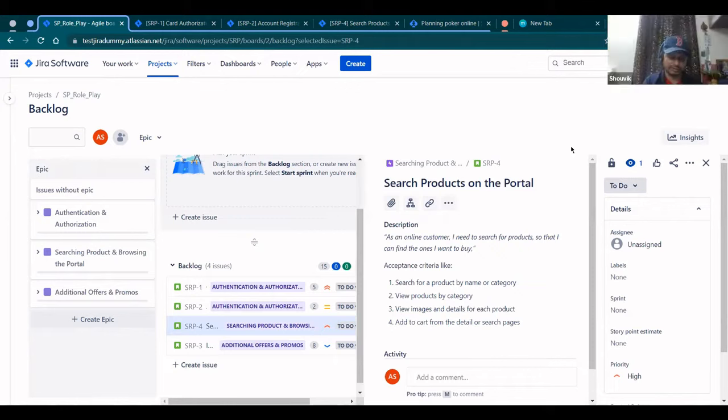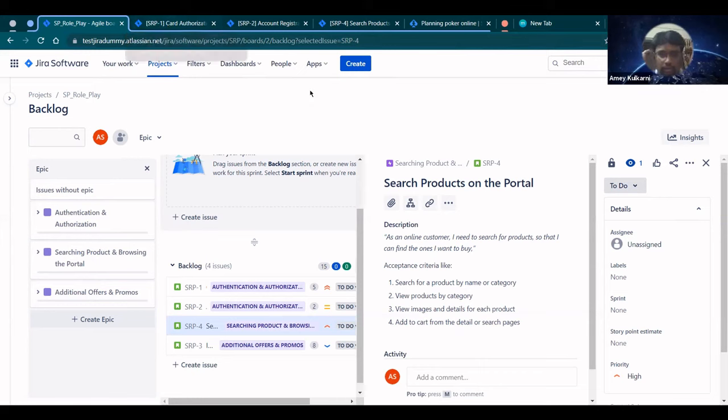And then a couple of more things: retain search and autocomplete. Even if a customer agrees to that, it will come up as a separate user story, maybe in the next sprint. This particular user story won't be extended. It would come as new scope, a new user story. Great. Okay, guys, any more questions for Amit? Are we all aligned about what this user story needs? Yeah, we are all excited now.